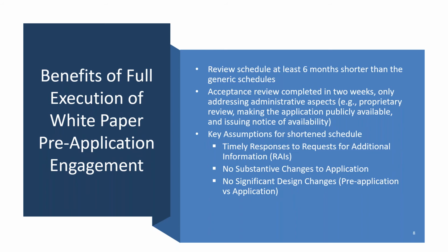Also, you should not be making substantive changes to the application after it has been docketed, meaning design changes that are substantial.